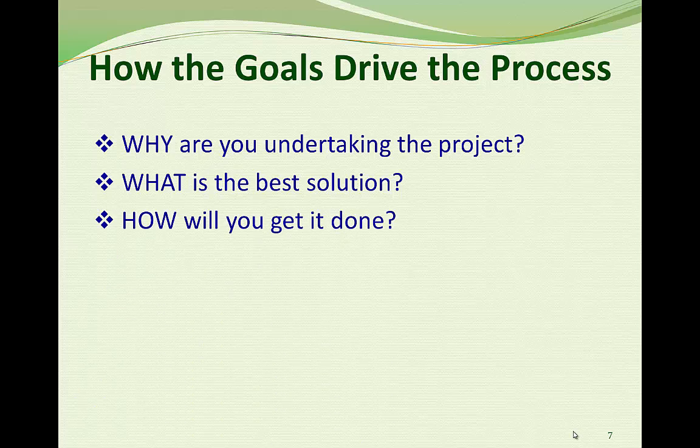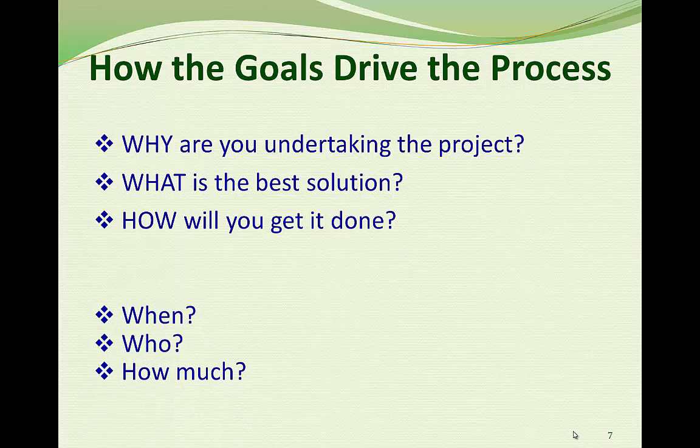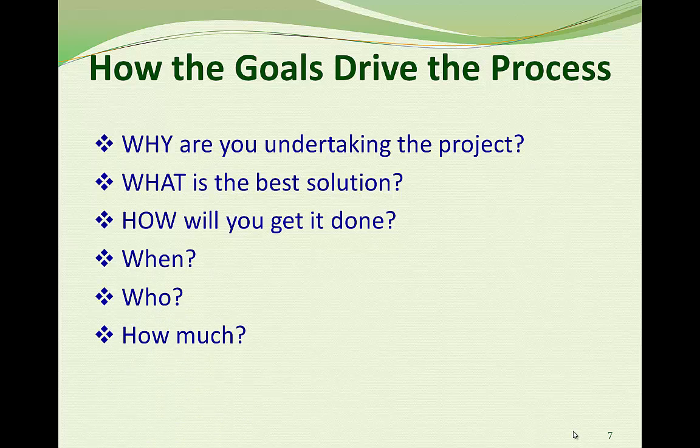Once you've determined the scope, you'll look at how to get it done. Will you do it all at once or incrementally? Will you do the work internally or using one or more contractors? Based on the what and the how, then you'll look at schedule, costs, staffing, whether you'll need legislative approval, what kinds of contractors you may need, and so on. Planning a project is the process of identifying those questions, researching the answers, deciding among your choices, anticipating your risks, opportunities, and constraints, and plotting your course.